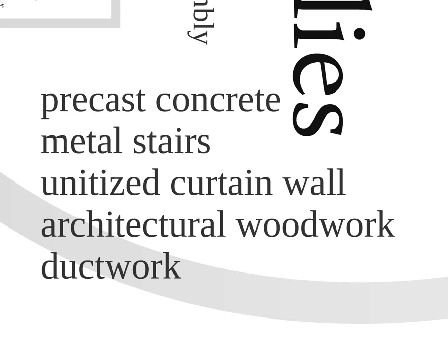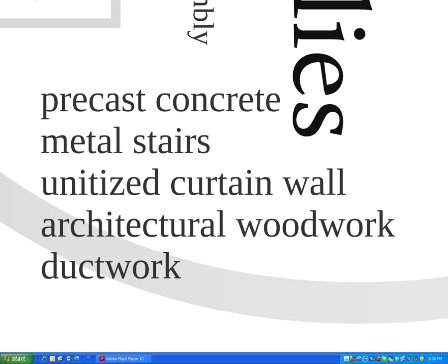One of the great things about BIM is that it allows people to prefabricate ductwork and bring it out to the site in large pieces that can be rapidly assembled on site, rather than having to have a guy with a press brake and riveting and other tools out on the site, making them by hand.